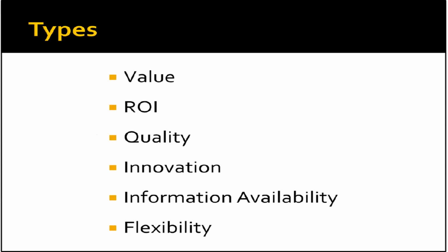By identifying at the outset of the project which variables and measurements you plan to track as a part of the project's success, you can make certain that the baseline measurements are taken and documented in order to show the impact of changes you have made. Of course, in order to track anything and determine if a project will be successful or sustainable, you will need to plan the data collection for after the project itself is completed.